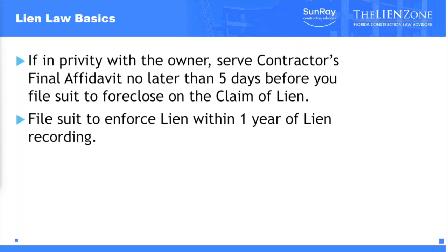And then the last date is you need to file your lawsuit to foreclose on the lien no later than 1 year from the recording date of the lien. Sometimes people ask me, well, can I just re-record the lien? No, that's illegal. You can't. I mean, the clerk will technically accept it, but it would become a fraudulent lien. So no, you can't do that. You have to file the lawsuit within the year for that lien to remain on the property.